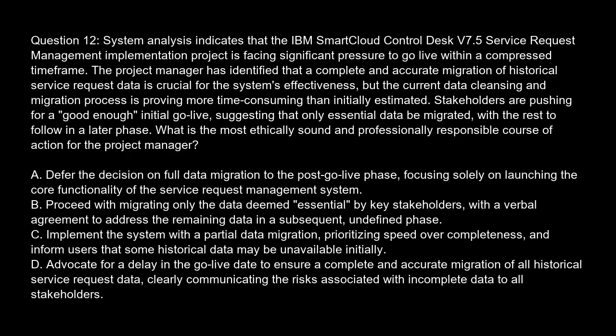Question 12. System analysis indicates that the IBM SmartCloud Control Desk V7.5 Service Request Management Implementation Project is facing significant pressure to go live within a compressed timeframe. The project manager has identified that a complete and accurate migration of historical service request data is crucial for the system's effectiveness. The current data cleansing and migration process is proving more time-consuming than initially estimated. Stakeholders are pushing for a good enough initial go-live, suggesting that only essential data be migrated, with the rest to follow in a later phase.